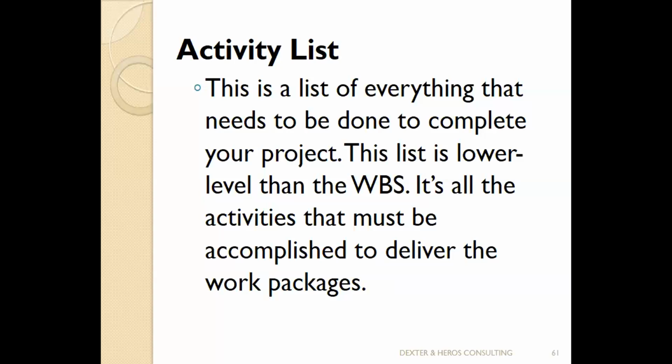Meaning, forget about the list of all your activities. Go home with this. You can define activities of the project as a whole at once, or if the project is complex, you just take it phase by phase and define. If the project is complex, I advise you, just focus on a phase. Wait with the activities for the next phase; you define this one.